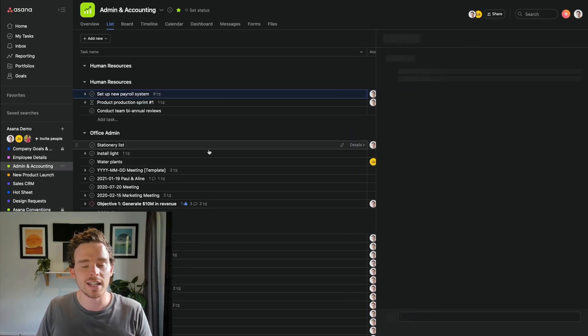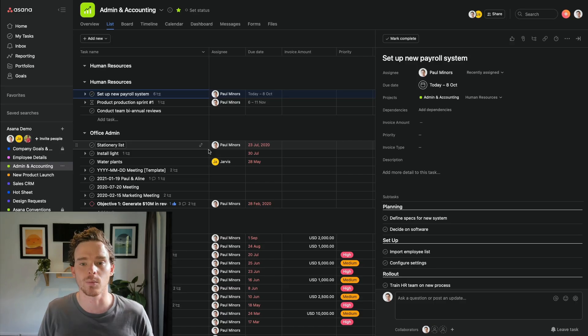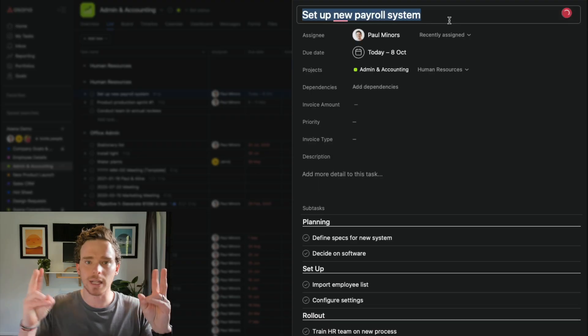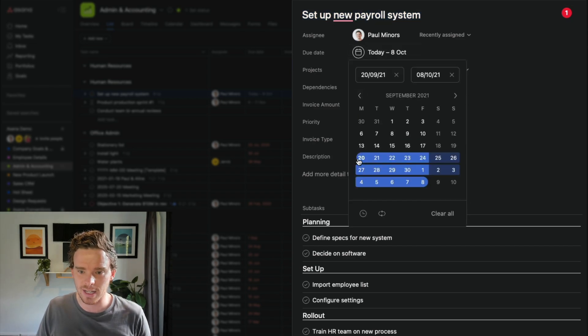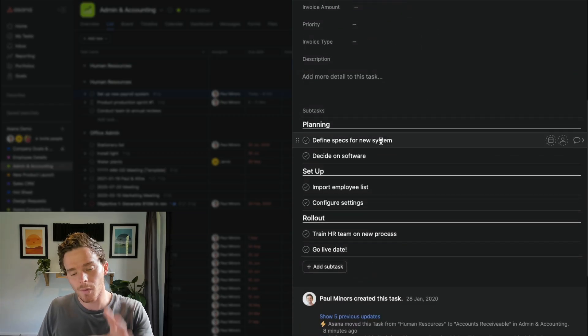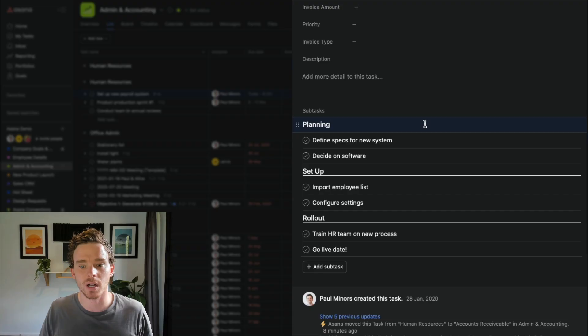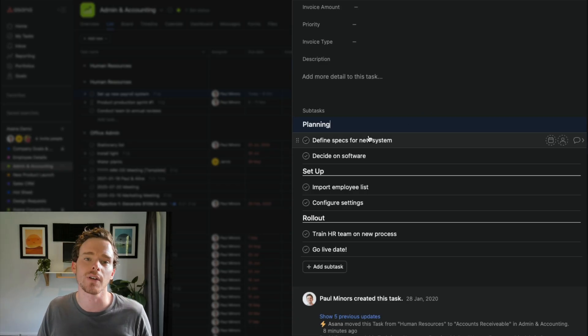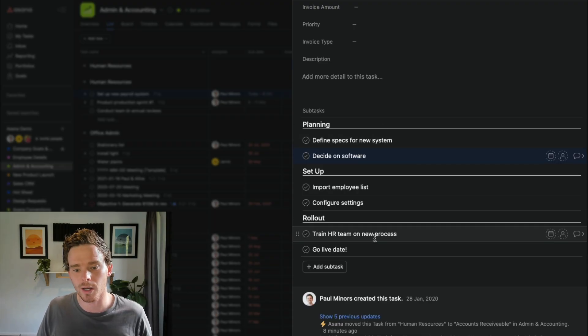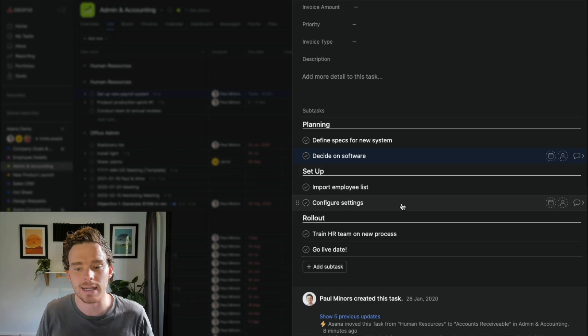In that case, how I like to handle it is to set up the project as a task in another project. Here's an example — setting up a new payroll system. This is what I call a mini project: not something done in one day, but not going to take six months either. I've allocated about two or three weeks to this task with a date range set. In the subtasks, I've created sections using the shortcut Tab+N, defining the stages of work much like a normal project, with subtasks for the actual work that needs to be completed.